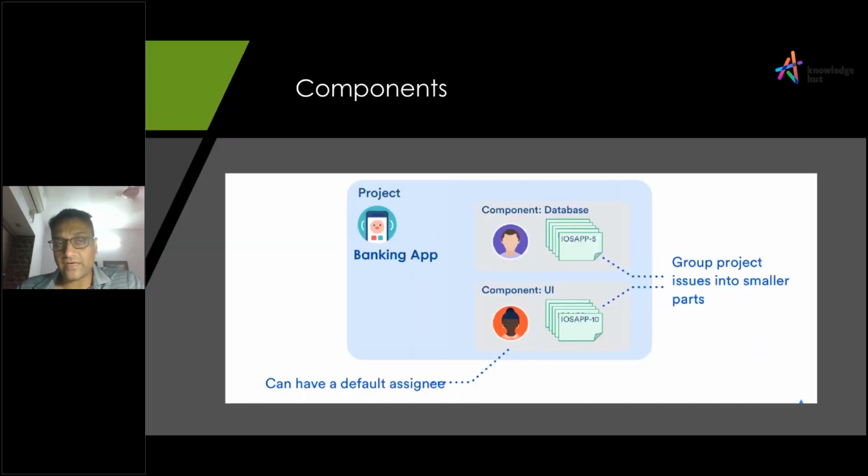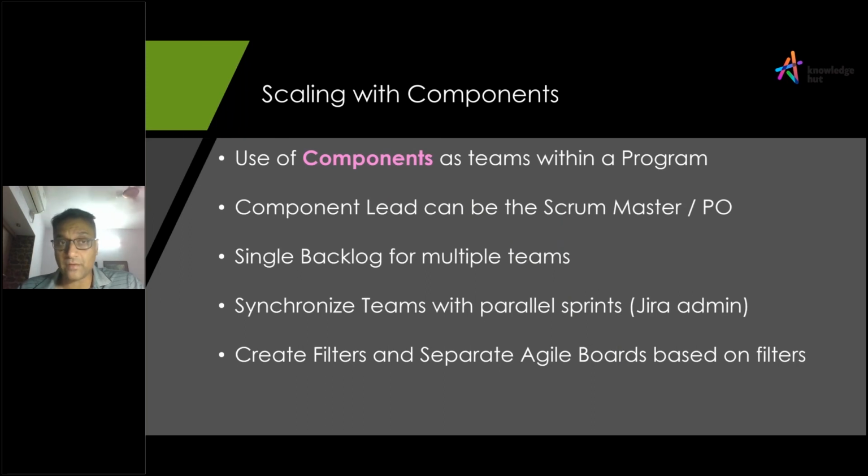And one of the last things I would like to cover is components. Every project will have components. As I told you earlier, you have the database and UI components, but you can also use components to track multiple teams' work. Consider your different teams as components, right? Then go back to your board settings and use your query results as your swim lanes, right?